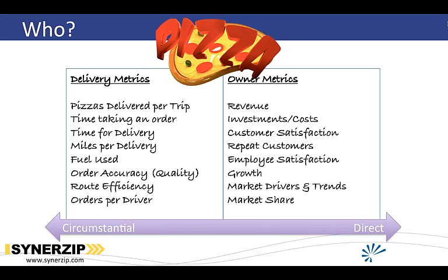Yeah, so when you keep things value neutral, what you're trying to do is, it by itself is not what's measuring value. It can't be based on any one number. Velocity is the perfect example, right? I want velocity to be a true measure of what's happening. So if my technical debt is going up, then what should happen to velocity? I want to see it go down, and it should have a reason. And if there's no incentives around it, then we have more transparency, and we can have a real conversation about, hey, why did this go down? Oh, it's because of technical debt. Well, what should we do about it? And then we have a real conversation about it.